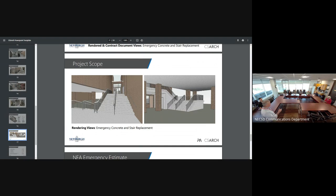It means contractors have to have this done by August 30th. Or else those students cannot use the gym because this is a required exit way for this gymnasium and that vestibule. So it has to be done in the summer. So it's either we do it this summer or we have this condition that's been around for far too long. We have to wait an entire another year to do it next summer. And we can't begin the work until students are out at the end of June because again, or else they wouldn't be able to use that portion of the building.